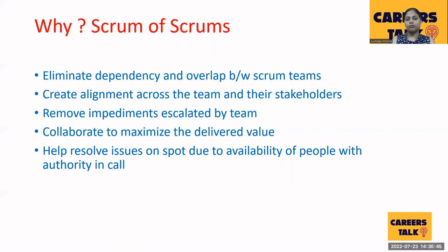For example, a team needs to do a major upgrade, and that upgrade might impact the other teams as well. So in that meeting we try to understand what the impact would be and what we can do as a group to minimize it. We talk about whether there is automation already in place which the team doing the upgrade may not be aware of. Another representative in the group can tell that team, go ahead with your upgrade, and since we have the automation in place, the verification part could be reduced, or we can do the verification on weekends.